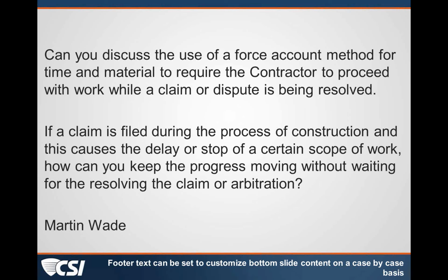Great, great. We do have a few things here. Kevin O'Barron is our usual additional commentator here. Lets us know that the rationale for the EJCDC's time limits is to resolve claims and disputes in a timely manner and to evaluate each claim and dispute on its own merits, and then also adds that the EJCDC has a, quote, work change directive, which is very, very similar to AIA's construction change directive. So you just wanted to add that to the additional comments here.